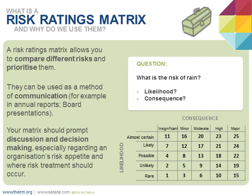Moving on to our risk ratings matrix and why we use them. The risk ratings matrix is the primary method used in many companies for ranking and prioritizing risks. The problem with a risk matrix comes when it is not tailored to your organization — people then arbitrarily rate risks based on their own interpretations, or ensure that negative risks sit below the threshold at which some action is required.